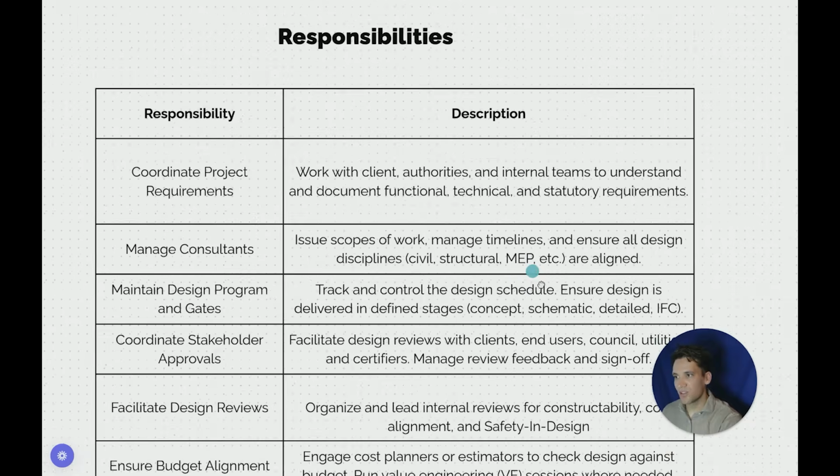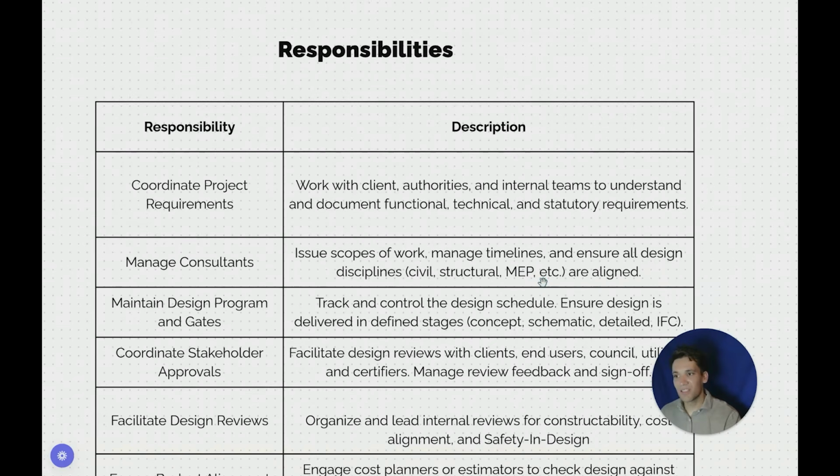They're managing consultants, so they're issuing the scope of works, managing timelines, and ensuring all the design disciplines are aligned, so the civil, structural, MEP. The design manager will manage the consultants similar to how a project engineer or a project manager will manage a subcontractor. The consultant is the subcontractor to the design manager.